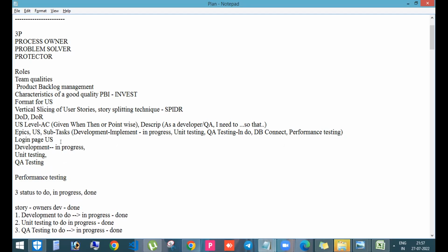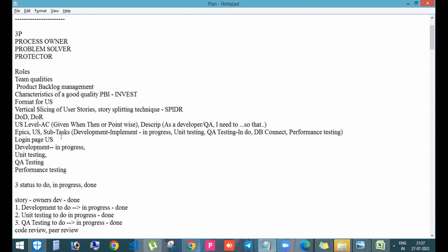Now consider that this user story is assigned to John. Now he is the owner. That means the developers are the owners of the user story. Always remember this. He is the developer. Now, after the sprint planning, he will create these subtasks. There will be an option to assign the subtask to someone, and he can assign it to himself. Anyway, in this story he is the owner, so that subtask also, he is the one who is going to work on.